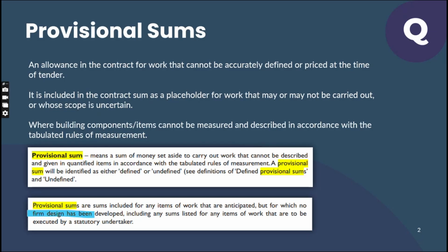He is the one who decides the material, which means as a client, you are losing an opportunity to choose the specialist. Yes, there is a manufacturer list, there is a material specification, there is supplier origin, everything is there. But again, the control is on the contractor's side.